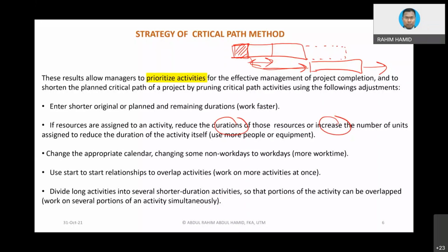Then change your calendar appropriately. We are the ones who come up with the holidays. Certain days of the week are basically holidays. If we are running late, then basically we should scrap some of the holidays. We should even work in shifts. We should prolong the day shift, instead of going home at 6, going home at 7 or even 8 every day. Then perhaps we can catch up.